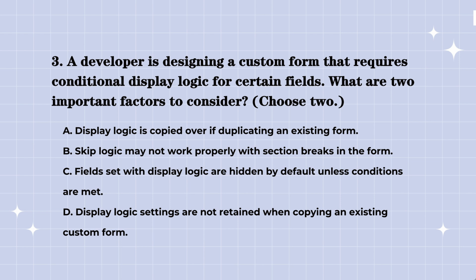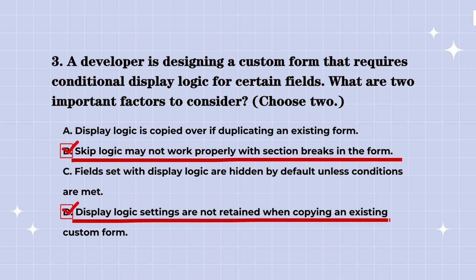So, the correct answers are: if you're using skip logic, be careful with section breaks. They can interfere with how the logic works. Also, if you copy a form with display logic, those settings won't transfer, so you'll need to set them up again.